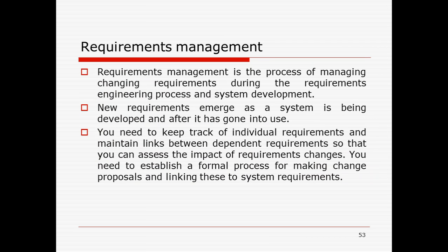The last major activity is requirement management. Requirement management is basically the process of managing changing requirements during the requirement engineering process and system development. During the development process, some changes to the requirements may arise, so how to manage those changes becomes part of requirement management. This is because new requirements keep emerging while the system is being developed, or even after the system has gone into use.